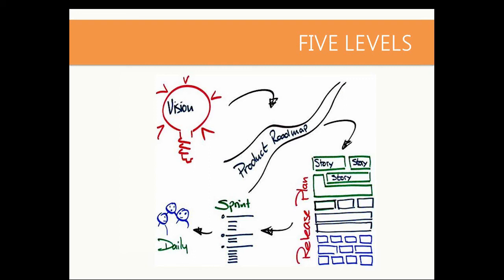That's where you work from a vision to rewrite an insurance system, the total rewrite, to a roadmap that projects which parts of the insurance suite get rewritten when and how many people we need, and some first rough estimates, to then focus on just one step on the roadmap, typically about 3 months' worth of work, with multiple teams, to do that release planning session that we talked about earlier, where the multiple teams synchronize their work, and then we drop into sprint planning and the daily Scrum as per usual core Scrum setup.